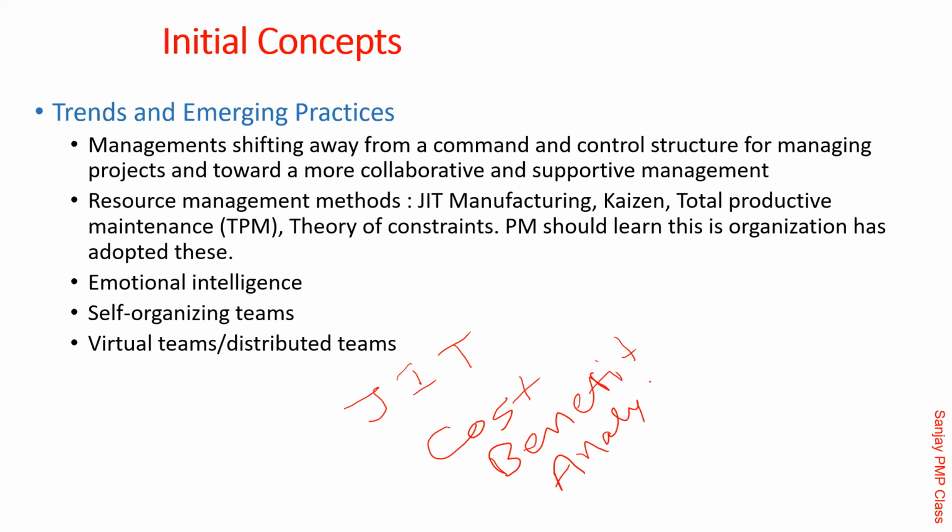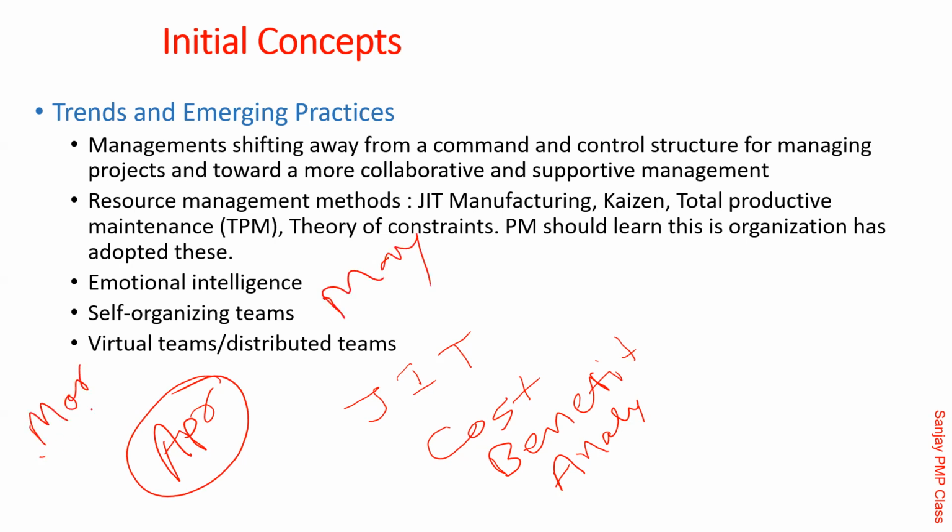So when we are saying JIT is a thing, they are not saying that every time you must do only the JIT way of working. In certain situations, it is good to go ahead and stock it. For example, if it is cement, and you are currently in March, and you need this material somewhere in May, and you are very sure that in April the taxes are going to increase, you might as well decide to buy it.